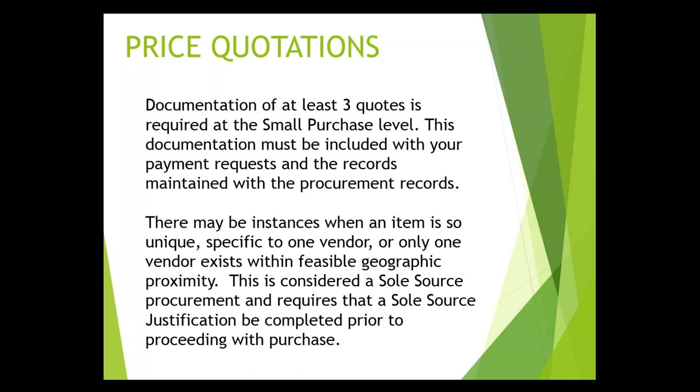There may be instances when an item is unique to one vendor, specific to one vendor, or only one vendor exists within a feasible geographic proximity. In this case, a sole source procurement may be required, and if there is a sole source, we need a sole source justification to be completed prior to proceeding with the purchase. In these instances, we ask that you contact your rep or compliance staff at ODOT Office of Transit to assist you with that sole source justification. We can walk you through that.